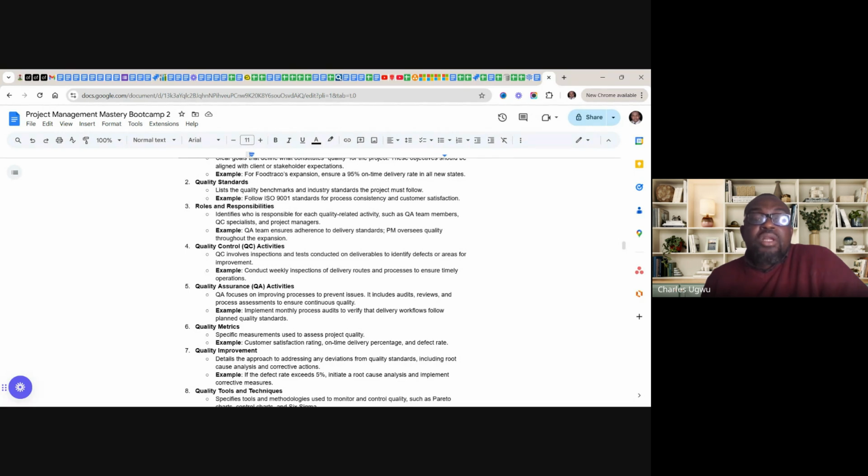that is quality control. Mind you that at the beginning here, we've identified that the objective is 95% on-time delivery. And if we need to make sure that we monitor or do control these activities, example, we need to conduct weekly inspection of delivery routes. Where are most of the delivery routes? We need to conduct weekly inspection on all the routes and processes to ensure timely operation.